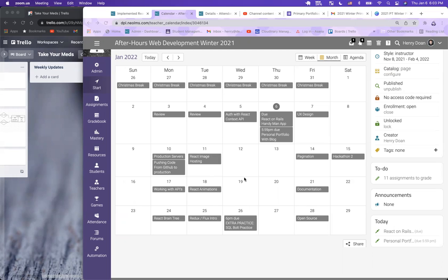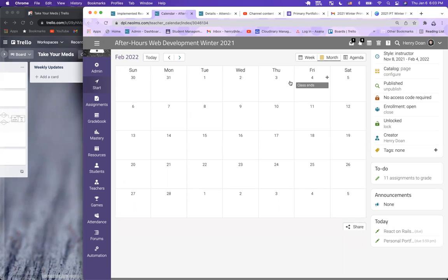The reason why I say 3 weeks instead of 4, is that technically this project is going to be due on launch day, which is February 4th. The reason why we don't have it due right on Friday is that there are some things we need to get done before we finish it off and wrap it up. For example, styling would be taking effect this week, as well as production, and also your video for Friday. So all of that time during that week will be towards those things instead of building out and finishing the application.